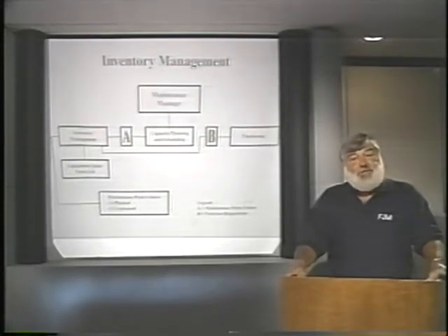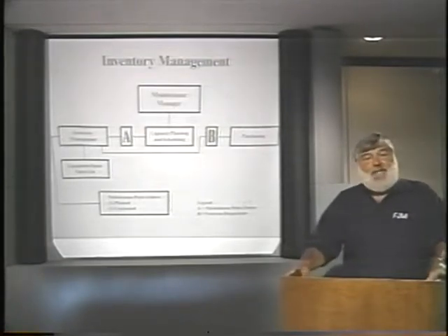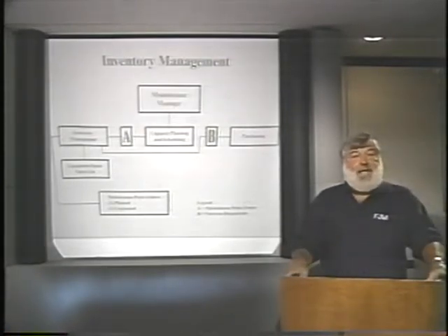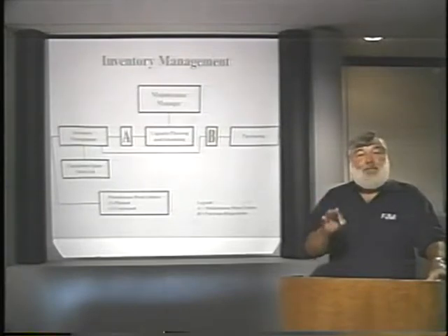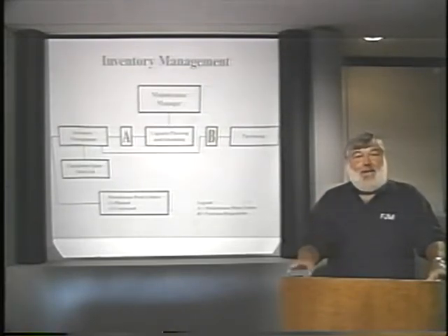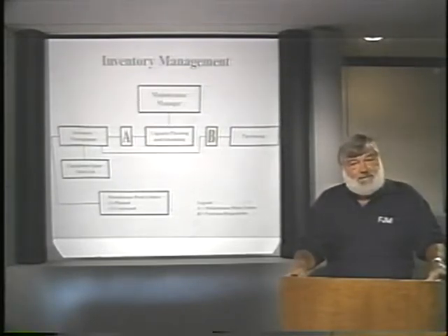When you're in a continuous process industry, you're going to be able to determine that your planned requirements are going to be up to 95%, if not more. And that will come over a period of time, but you'll never be able to develop that percentage without the proper inventory recording system.